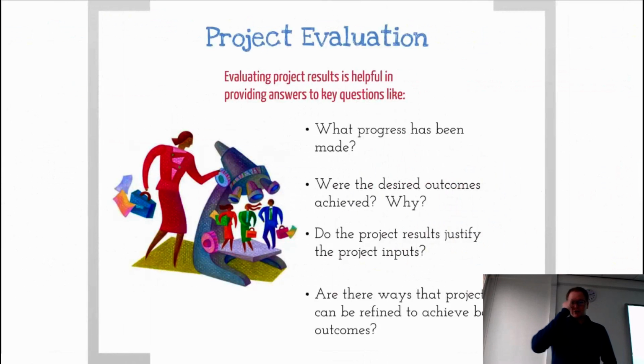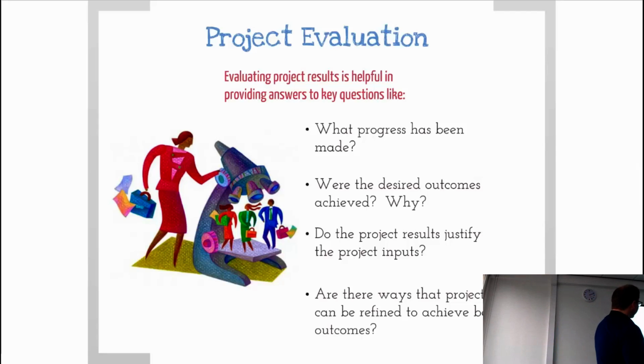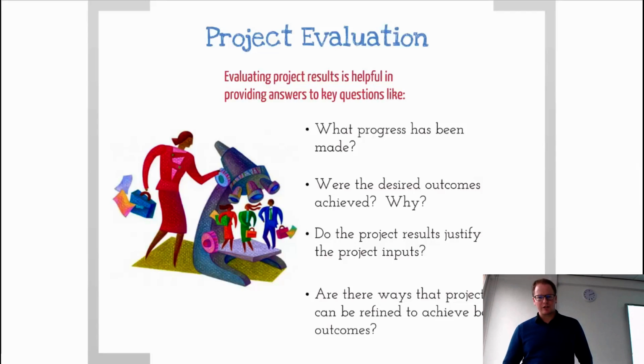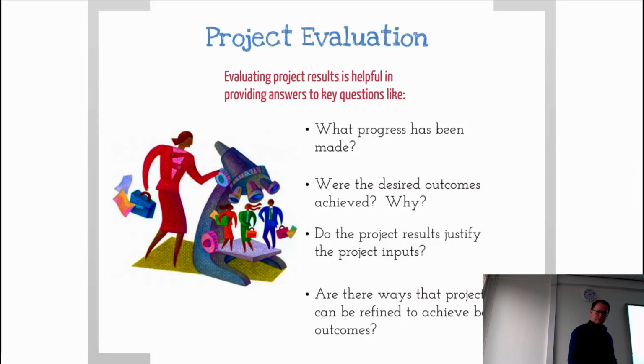Evaluating project results is helpful in providing answers to key questions like: what progress has been made? So again, it potentially gives you milestones that you are hitting. Were the desired outcomes achieved? Why? Do the project results justify the project inputs? And are there ways that project activities can be refined to achieve better outcomes? So these are normally the traditional questions, and the idea is to work through that with your team, maybe a sustainability consultant if you haven't done it by yourself, and your client and the community that is affected, your stakeholders.